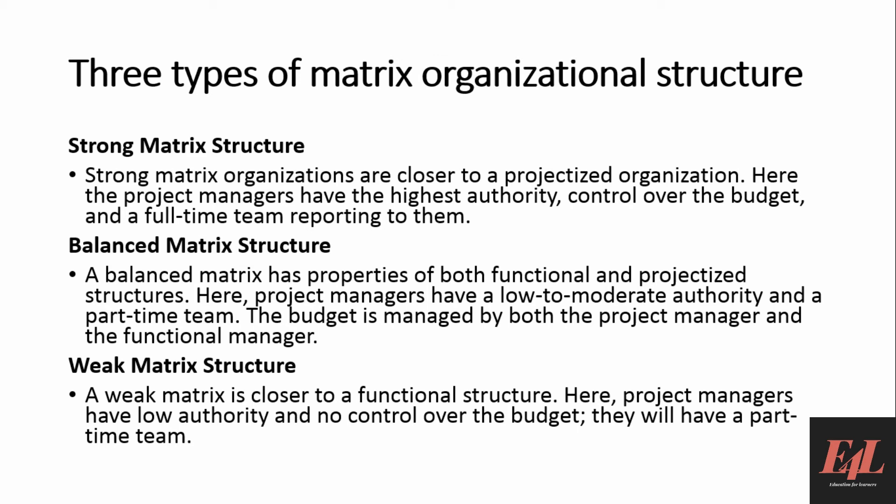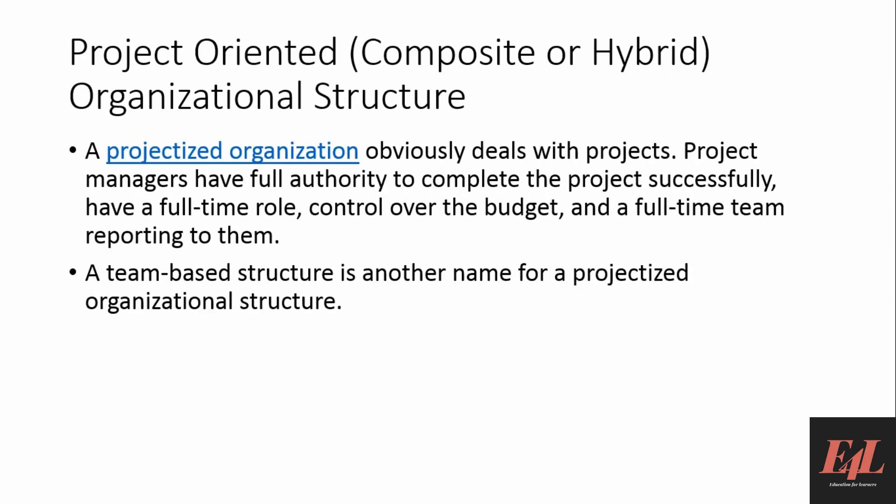In a weak matrix structure, the organization is closer to the functional structure. Here project managers have lower authority and no control over the budget, and they will have a part-time team.